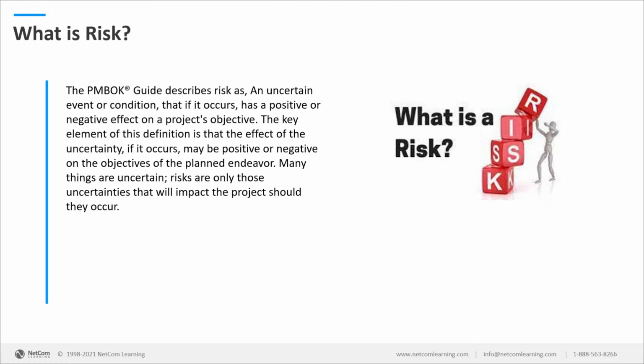So what we're going to refer to this particular number that you're going to give to your leadership as is an estimate. That will be called an estimate. That's not a true figure until you actually go ahead and spend exactly that same amount. Now, possibilities are that amount has been approved. Once that amount has been approved by the leadership, that becomes your baseline.